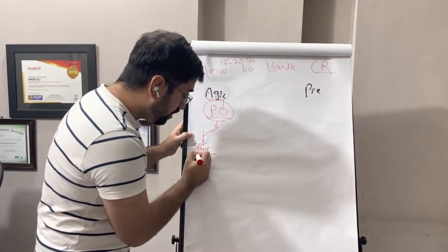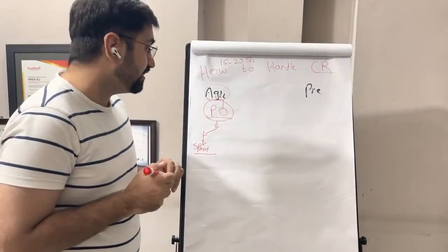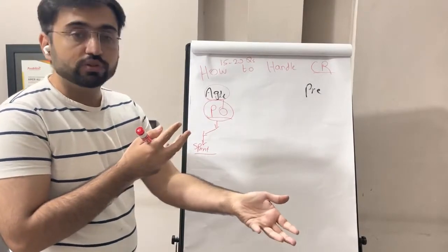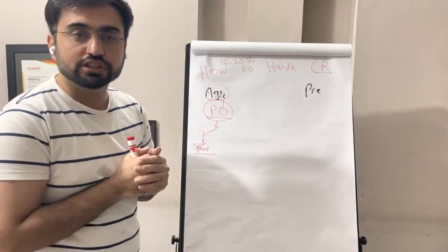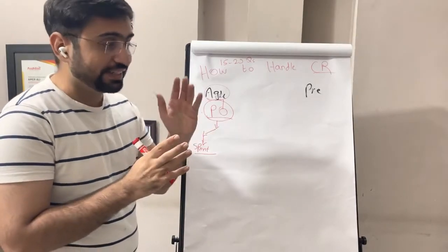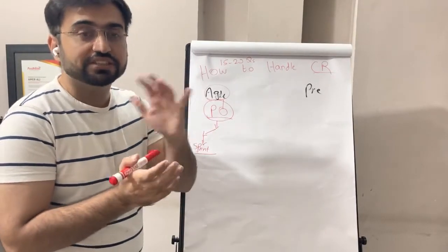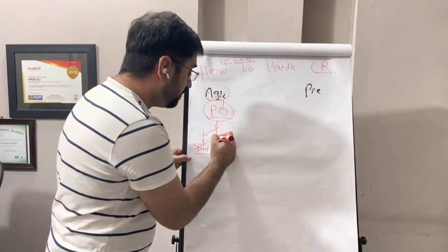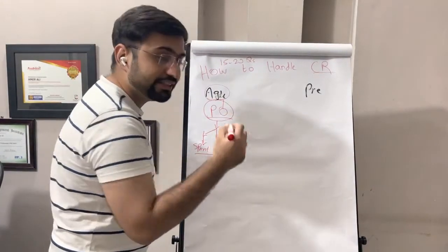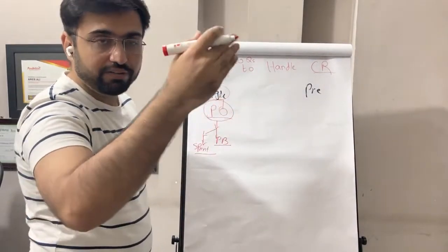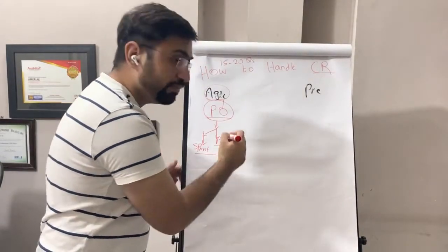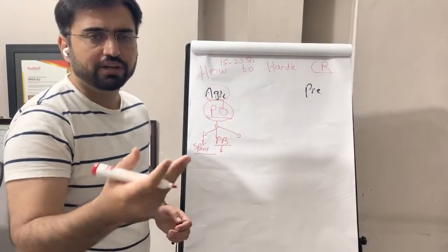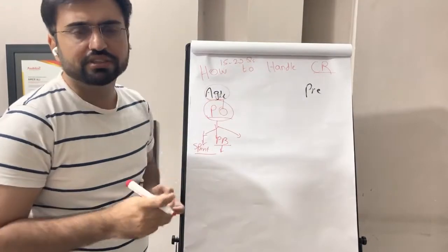Yes, this is important. Only the product owner can add anything into the current sprint. He will have a discussion, a trade-off with the team, like taking out some of the user stories to maintain the velocity. But he can put something into the current sprint backlog with the discussion of the team. Now, if the change can wait until after the sprint, the product owner will add it to the product backlog, refine the product backlog as high priority, high value, high risk, and then that will become the most important thing. If the requested change is of low priority, it will go into the product backlog and it may come into the next or subsequent sprints.